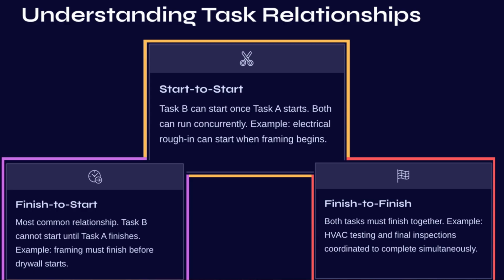First, every task needed to complete the job needs to be listed. Then determine the logical relationships, which tasks must precede or follow the others. These relationships fall into categories. So the categories that we're going to be talking about are a finish to start, which is the most commonly used in construction. You can't start activity B until activity A finishes.